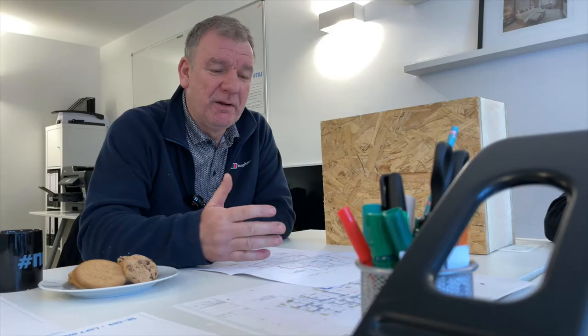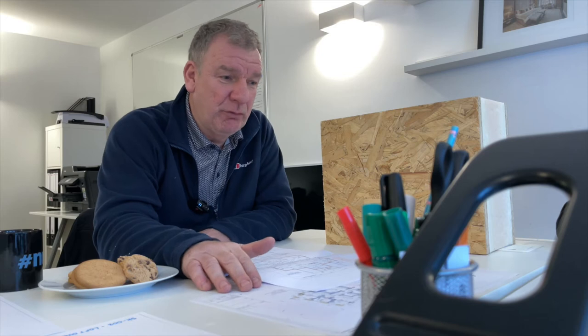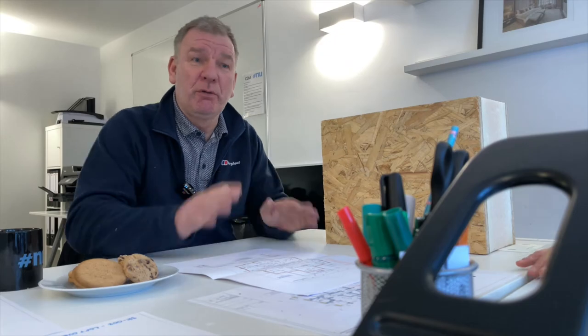If we were in at the beginning, we probably could have taken some of the steelwork away, with the way we build. Mitigated it with the use of the structural system. So we can make savings. For argument's sake, we did a school in the Lake District, and they had £200,000 of steelwork in it. And we fabricate our own steelwork. We've got third-party accreditation for that. But Saul looked at the engineering on it and removed £200,000 worth of steelwork from it. So we did it without any steelwork, so there's a cost saving there as well. The school didn't have the budget, so when Saul removed the steelwork, it brought the budget down, they could build it, and it got built.